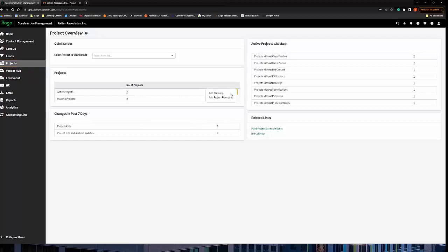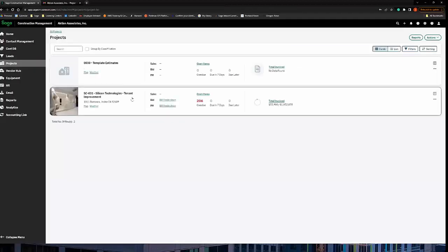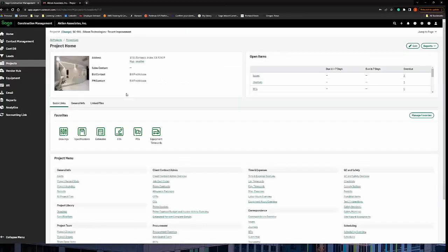And a couple ways to do that is either A, again, if you're not tracking it within the system, you can create a manual entry by manually putting in all the values that we had before, project name, basic details around it, the contracts, all of that. Or you could just simply hit lead from project. And when you do that, you're just going to follow a simple wizard that would convert that Farmington project into an active project, which we would be able to view from here. All right. So this is a list of all of the active projects currently in the system, the individuals who are pertaining to this or are working on the project. And then as we open up, you're going to see these menus.